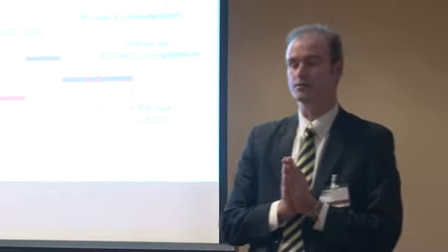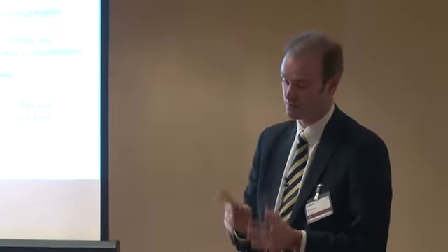In an ideal world, to work out the effect of a delay on completion, you update the programme to immediately before the delay occurred, and then impact the delay to see what the effect is immediately thereafter. You should record everything at that point and see what the delay was, record it, and then if you want to mitigate, you can mitigate and show the other side what you've then done. You might have even used additional resources or resequenced your program. You can then do that afterwards and show that as a separate step, because it's a very good question,